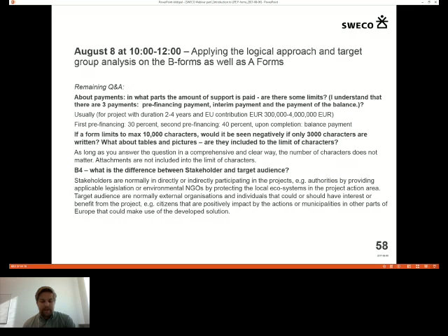So you need to be aware of that. The European Union will owe you some money during the course of the project. You will have to use your own money, and you will not get the full amount before you actually pay for things.